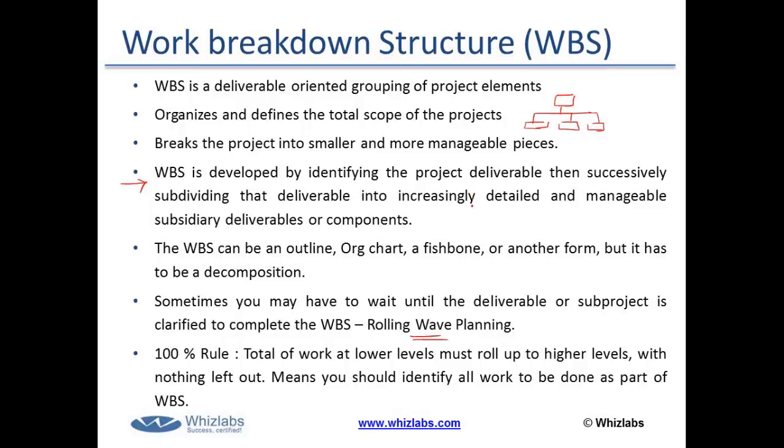Then you keep breaking down each element further. So there is not much difference when you look at the end result, but the way you create the WBS is different. You take a top-down approach. That is, you keep breaking down the project scope till the time you cannot logically subdivide further.